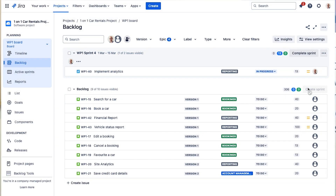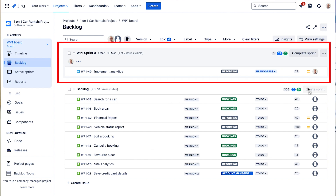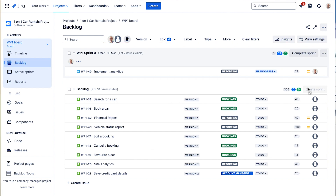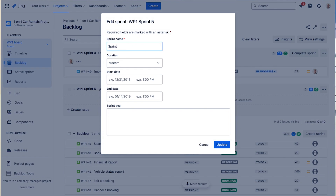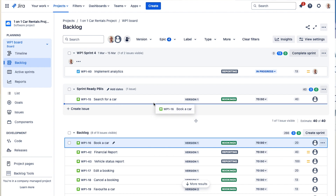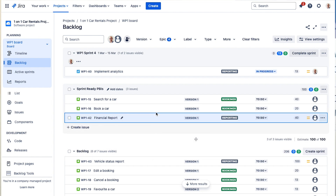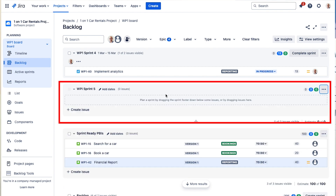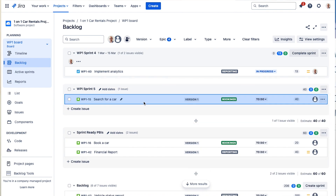Once all criteria has been met, we say the product backlog item is sprint ready — ready to be brought to the next sprint planning session. A popular way to indicate sprint readiness in Jira is to create a sprint labeled 'Sprint Ready Items' and drag items into it when they're ready. This lets you see upcoming product backlog items that have been adequately refined. One drawback is that you may lose priority ordering for items still being refined in the backlog below.